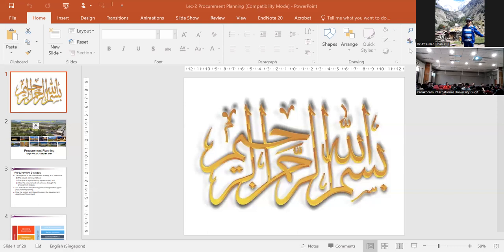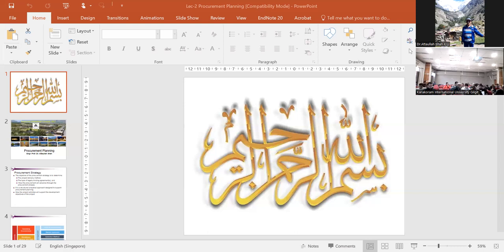Under the JV agreement, they should specify their roles. For example, a partner may not be involved in execution but can provide financial support to the smaller partner. That's why I always emphasize that the JV partnership must be executed on the PEC bidding document. The PEC JV document is 56 pages long and provides all details: who will be the lead partner, who will execute the project, what will be the role of each partner, who will financially manage and physically manage the project.